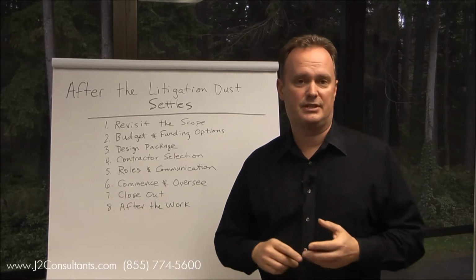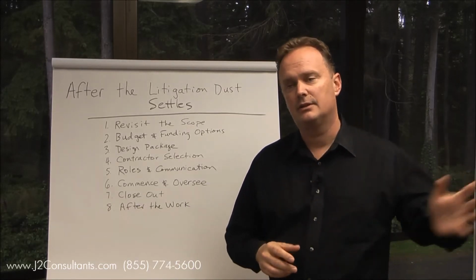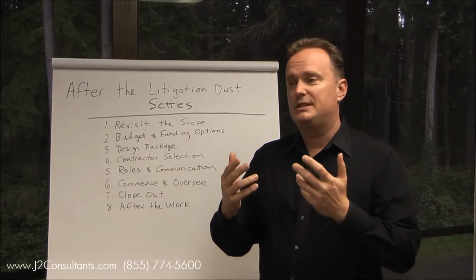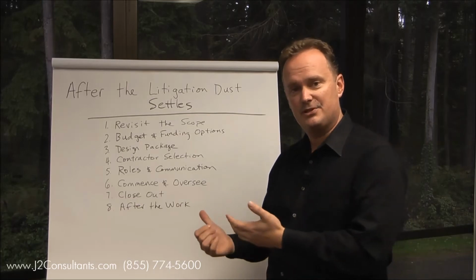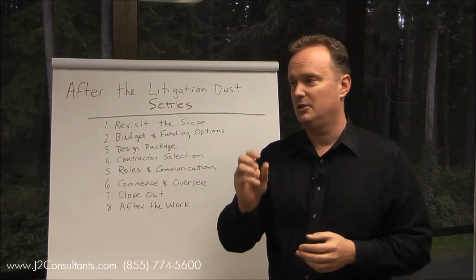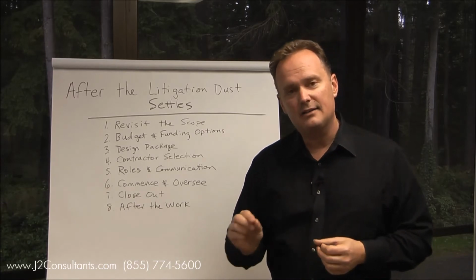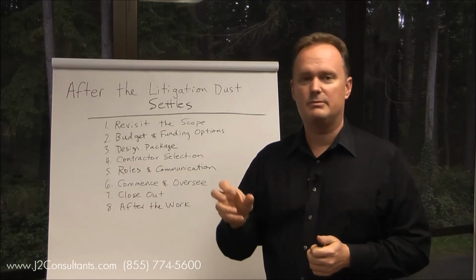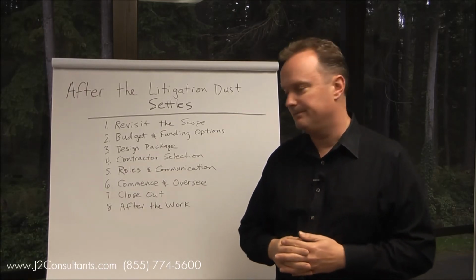Resetting your reserves. I talk about reserve studies in another video, but now that you've redone your siding, you can go back to your reserve study and say, hey, wait a minute, we don't need siding repaired in 5 years. We get to reset that clock, so this siding is now good for another 20 years. So that changes your assessment amount, and that changes your reserve amount.